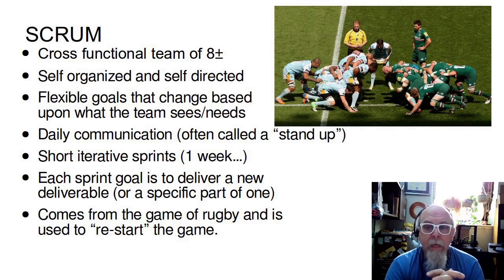Usually a Scrum team tries to set goals weekly and creates what are called sprints. A sprint is, here's our goal for the week. We're all going to work hard and make that happen. We're all going to score this goal once a week. Each sprint, we hope, delivers a finished product, actually delivers a version of the software that can go out to the user